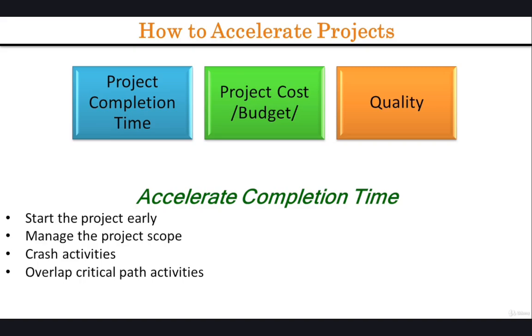For example, it seems plausible that the activity building design should be completed before starting activity building construction. However, does this imply that all of the design has to be completed? Or maybe would it be possible to begin digging the foundation of a building while the designers are still finalizing the shape of the windows? By identifying the exact dependencies among activities, it is often possible to provide the dependent activity with a head start.